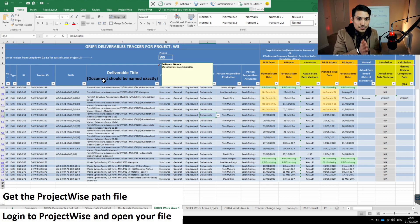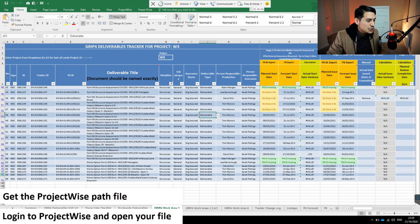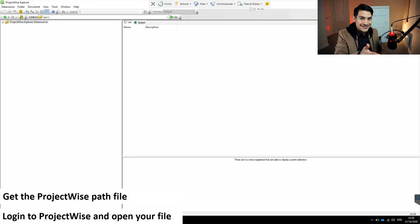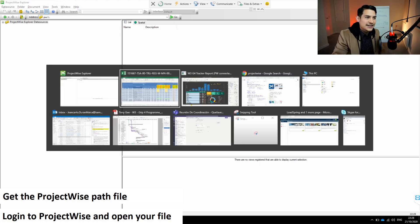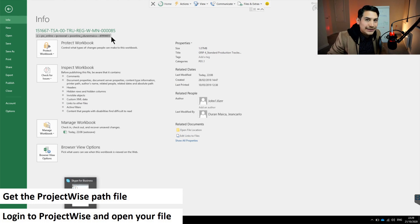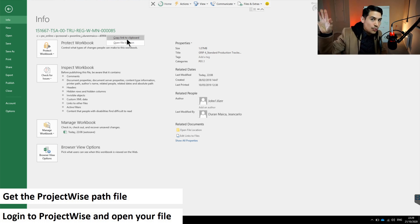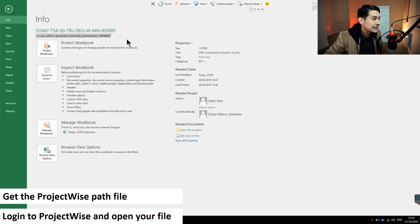This is very important — you need to create a bridge between your computer and ProjectWise, and that bridge of communication needs to be open. That means you need to be logged into ProjectWise; ProjectWise needs to read your credentials and be open so that bridge of communication is working. After making sure that's happening, go to File and get the path file — this is the most important information. Click 'Copy link to clipboard.' This link will only work as long as your ProjectWise connection is open.